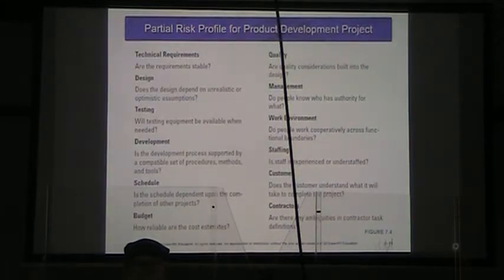Schedule. Is the schedule dependent upon the completion of other projects? Right? A huge consideration. Will we be able to finish this project if project X fails? Our budget, how reliable are our cost estimates? Our cost and time estimates are of the utmost importance when we are planning a project.